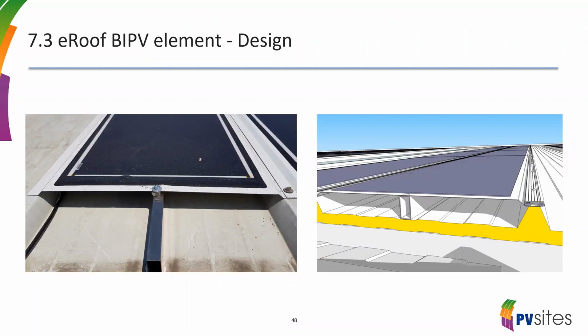The first problem is that we had to design it before we could really see the details of the roof, because you're not allowed to go on the roof itself. But later, in the stadium, we found out it's different. So we have to make the holes in the module to fit over the existing bolts. Next one.